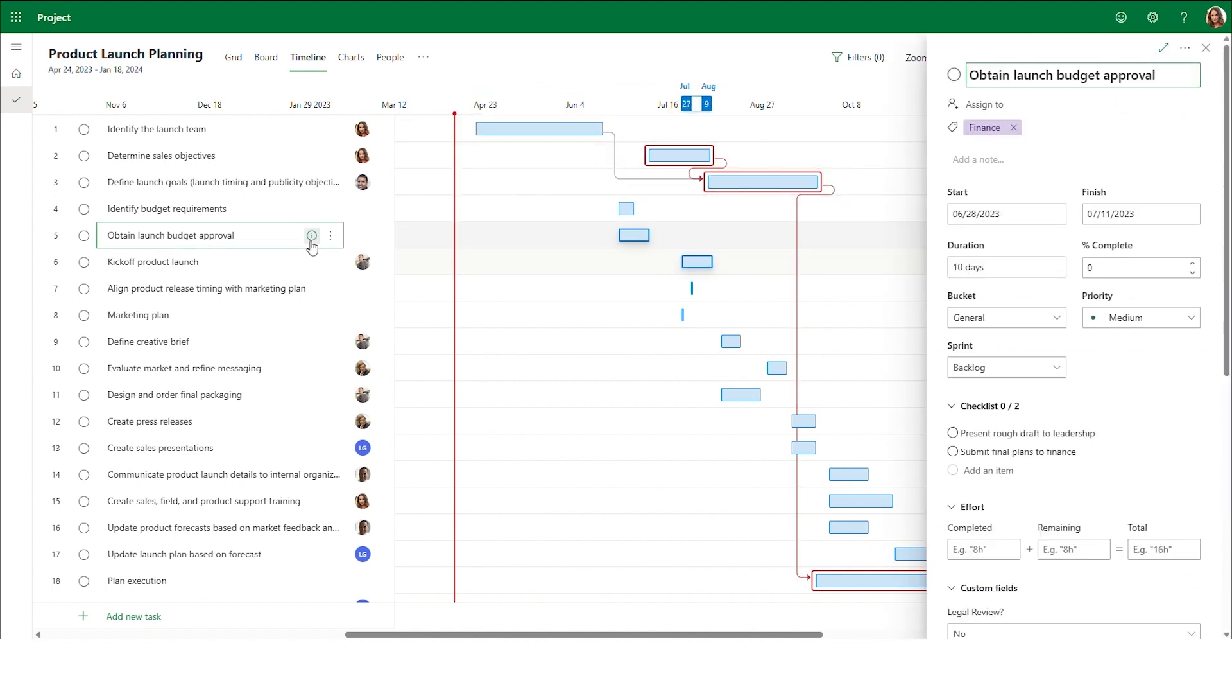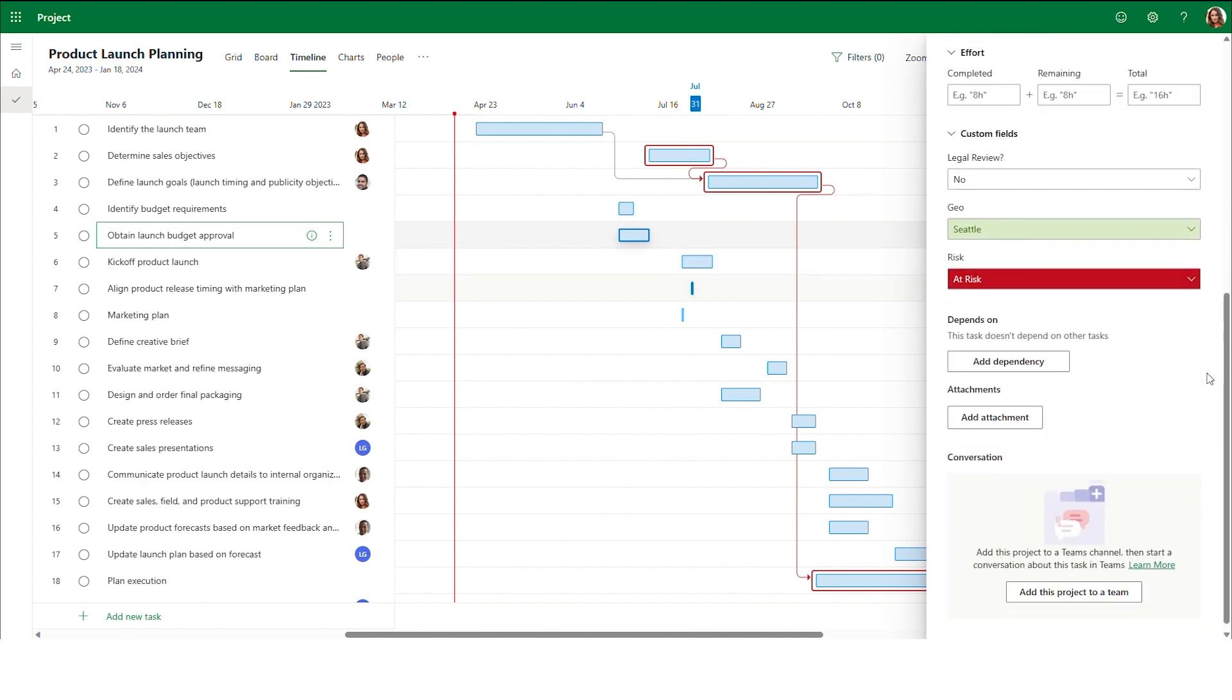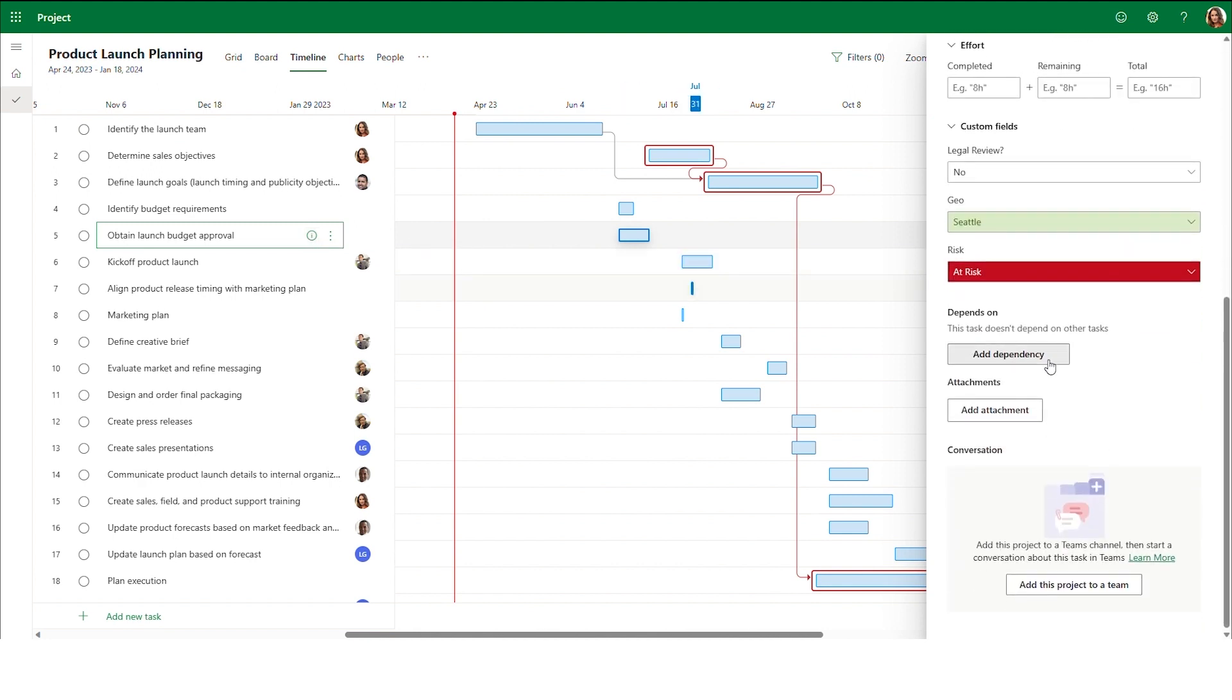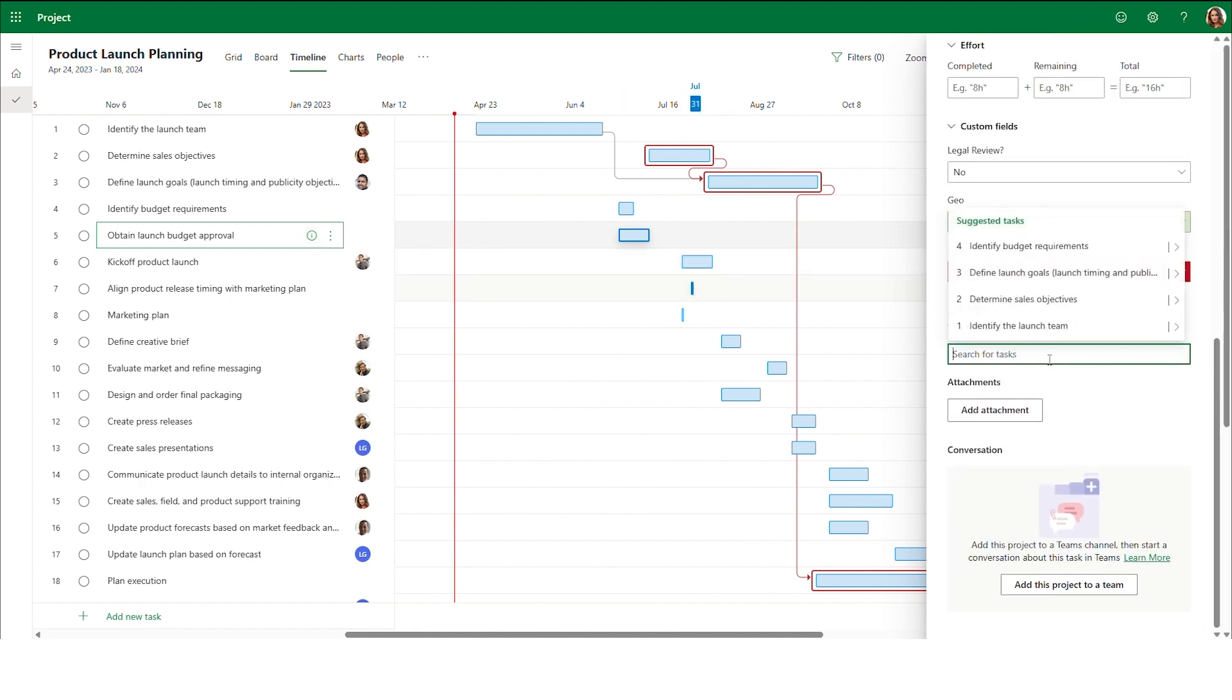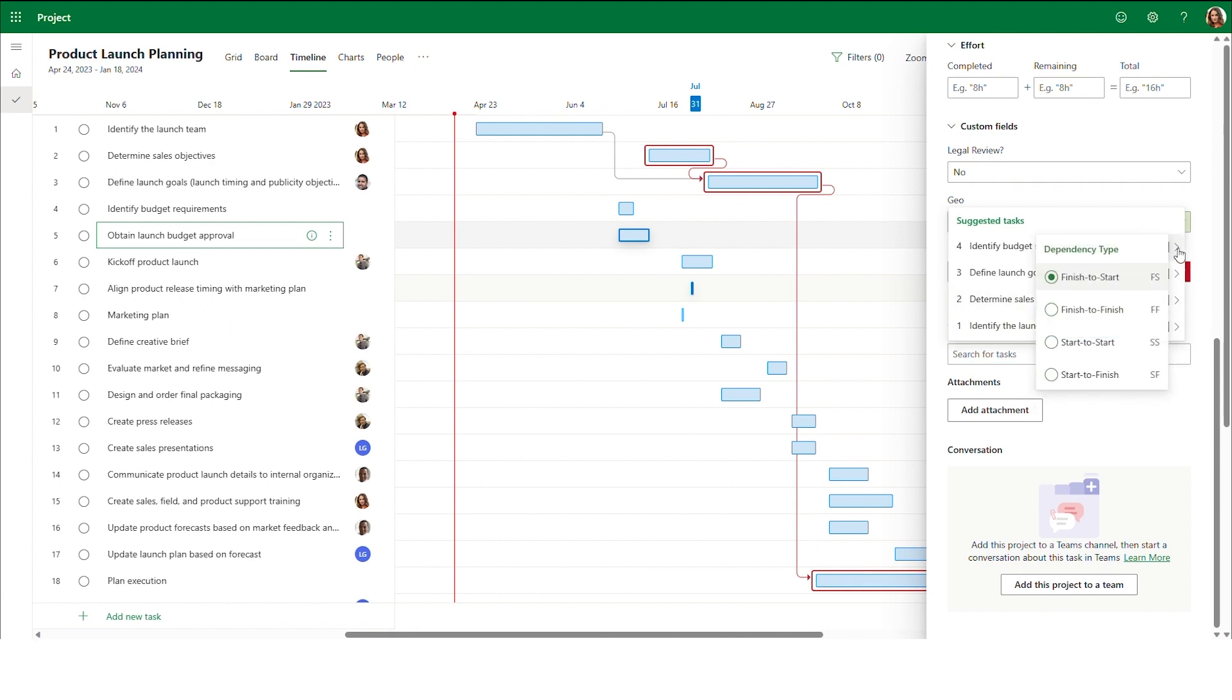Now, let's talk about the different types of dependencies available. The first type of dependency that is available is finish to start. This is also the default type for all dependencies if another type is not selected.